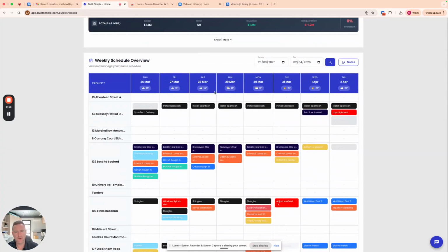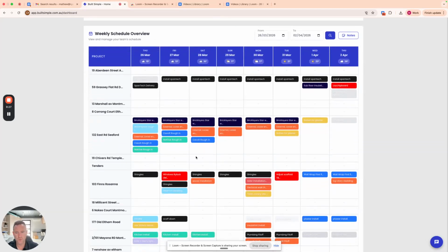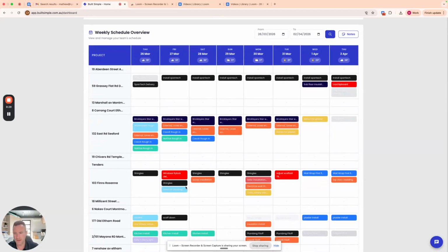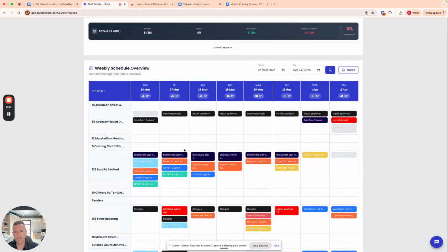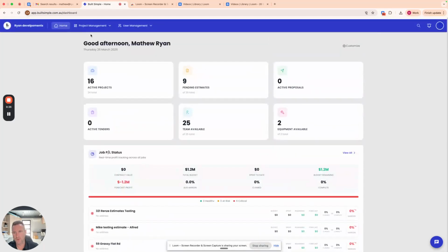Better, having the weather app function. So if it's going to be a rain day, and you're going to be pouring a driveway or an outdoor activity, you can simply adjust accordingly. You can see the weather in advance. You'd make sure the trades aren't double booked. We use a number of the same trades across the project, so if there has been a double up, you have the ability to see everything in one place and move.